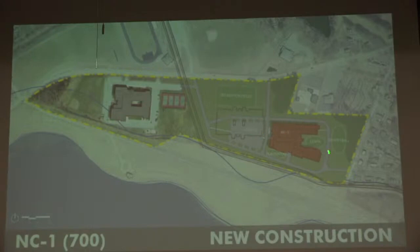So here, simply put, a contractor could have great access off of South Main, could really fence this off easily, still allow for parents and emergency access around that existing building while construction's going on, open the new building, tear down the old building, and then you'll open for a year while that building's being torn down, and then you'll finish out your site features.